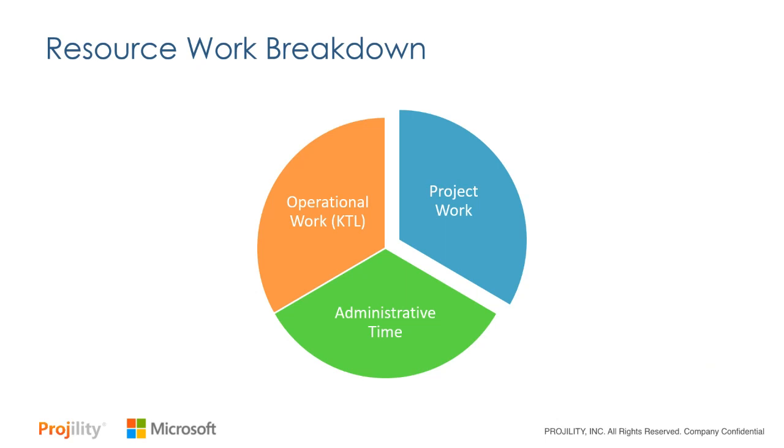If we look at it, there's really a breakdown between three kinds of work in an enterprise or an organization. We've got what we call operational work, which is kind of keep the lights on, maintenance work, things kind of heartbeat of the business. In IT, it can be things like infrastructure and server maintenance. On the business side, it could be things like working on specific day-to-day activities and tasks. It does take up a percentage of a person's job. In some of the research we've done looking at the analysts, they will tell you it's anywhere from 10 to 30% of people's time. Higher numbers on the infrastructure side, lower numbers on the applications or business side. So operational work is a big part of people's jobs, keep the lights on or KTLO.